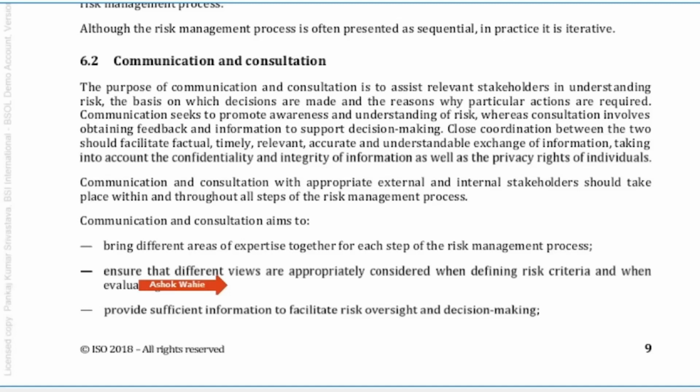Then, when we are evaluating the risk, we compare the risk value with the criteria. So, should we evaluate it as high, low, or medium? If it is high, then what mitigation strategies should we choose? So, we need to communicate and consult with everybody who's involved in the risk assessment so that we can take an informed decision. So, this particular communication and consultation approach will provide us with enough information to facilitate risk oversight